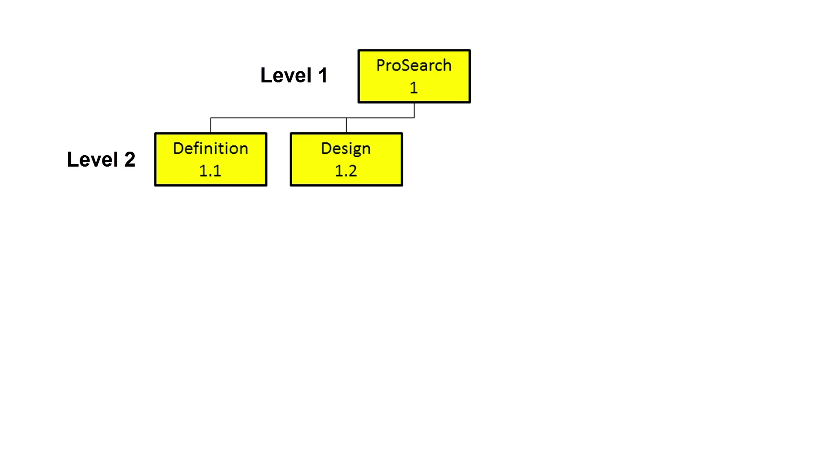Next, the programmers have to write the code and build the new features. The next deliverable would therefore be Build.